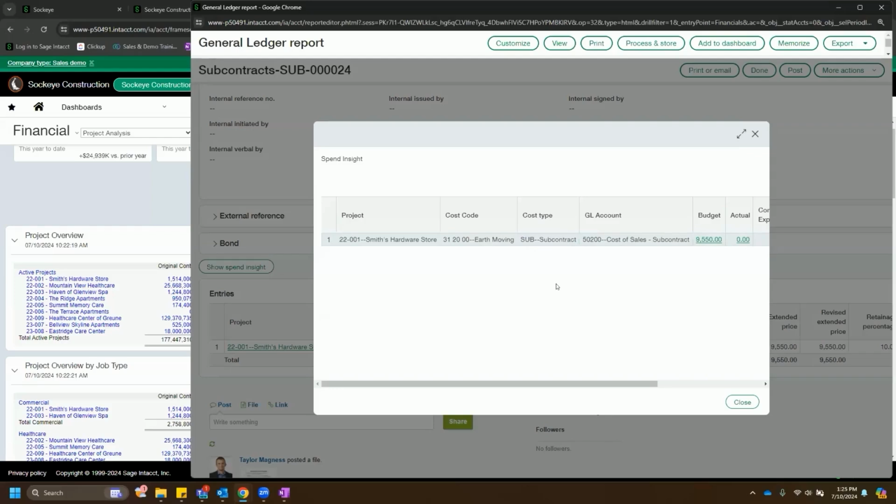And so when a user is coming in here and coding, we can configure this to react one of two ways. We can have it just flag or warn us, or it would essentially populate a banner up here at the top that spells out exactly where it is that we're over budget on which line in that document, but they could be allowed to proceed.